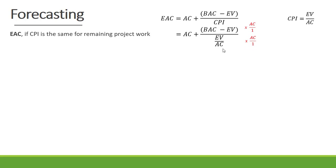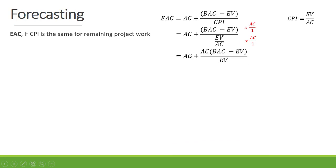So that's our actual cost plus budget at completion minus earned value, divided by earned value divided by actual cost. Now if we multiply above and below the line by actual cost, the actual cost cancels out below the line. So we get actual cost plus actual cost times budget at completion minus earned value, divided by earned value.